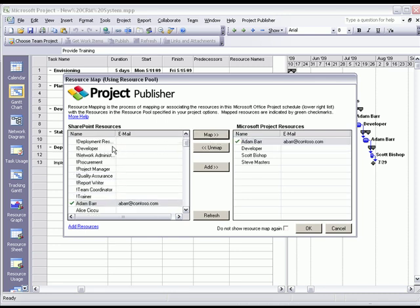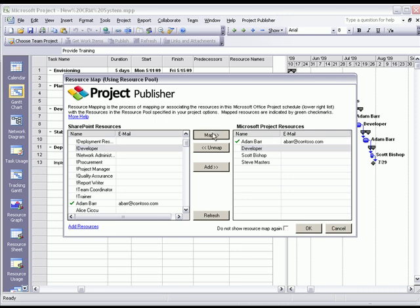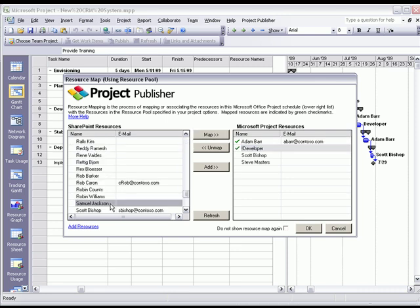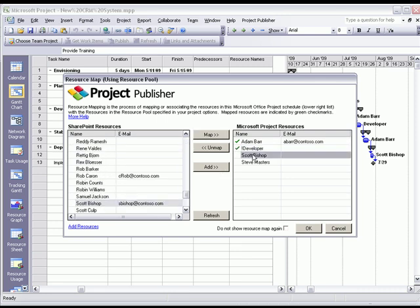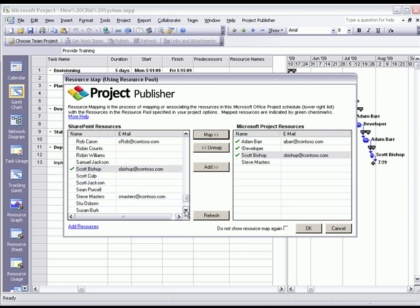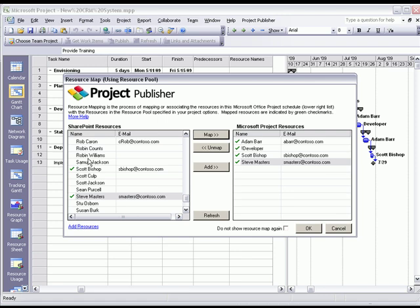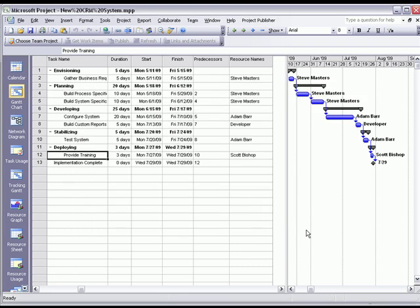We're going to go ahead and map the developer, and we have obviously Steve Masters. So now what we've done is we've taken resources that are in SharePoint and EPM Live and mapped them to resources that are in the Microsoft project file. So now we'll go ahead and click OK.